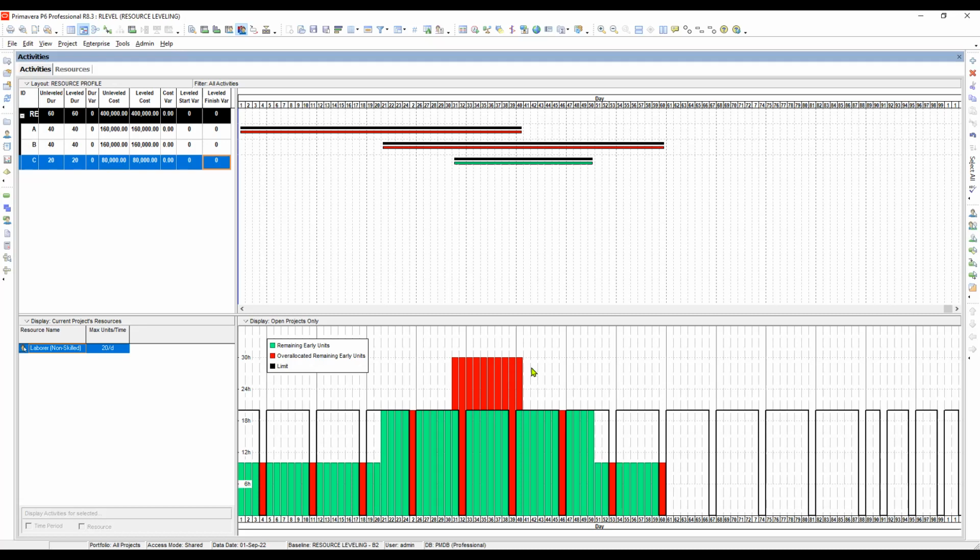If you just want to satisfy yourself, to show no over allocation for your schedule by reducing the budget or the allocation, that is not reasonable, unless there is a reason that you reduce the allocation due to a miscalculation in the original computation, then that is reasonable. Otherwise, let it be.